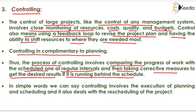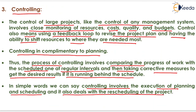In the controlling process, we take care of the progress of work in the project. If any activity is behind schedule, we deploy extra resources for its completion within a particular time interval. If any activity is ahead of schedule, we take resources from it and deploy them to activities that are running behind. In simple words, controlling involves the execution of planning and scheduling and also deals with the rescheduling of the project.